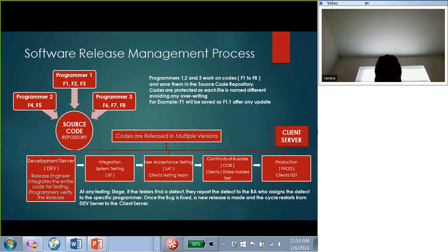So the final testing performed on the product before it is delivered to the customers is called UAT testing, user acceptance testing. Now normally what happens is, see, these are business users we are asking them to test. Do you think they can sit from morning to evening and test? No, they don't have time. So maybe in a day they'll spend 1 hour or 30 minutes. So what they do is they again hire a dedicated testing team. So in addition, just like IST testing, they will have another testing team, but this testing team is testing on behalf of the business. They are doing the same job. They have their own strategies and things.